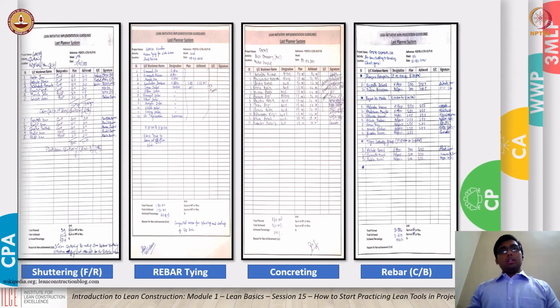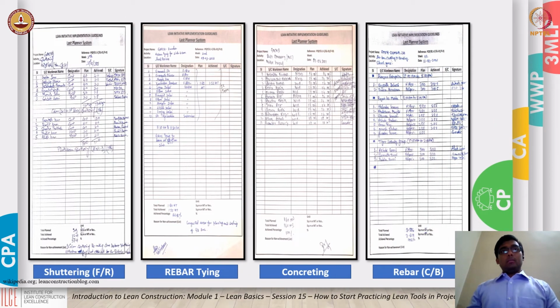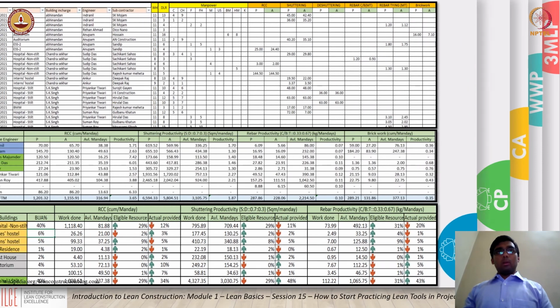In this step, the actual daily plan is explained to manpower while having toolbox talk by the site engineer, and individual manpower responsibility is highlighted and mutually agreed. At the end of the day, the work done is tallied with the commitments made and the reason for failure, if any, are collected from the manpower. If this issue persists for consecutive days, it is discussed in the daily review meetings and mitigation plans are worked out.